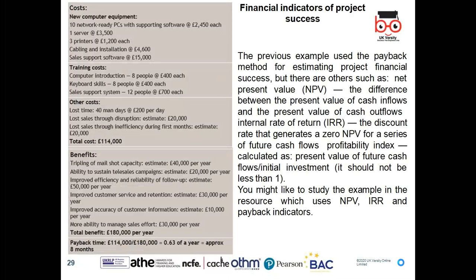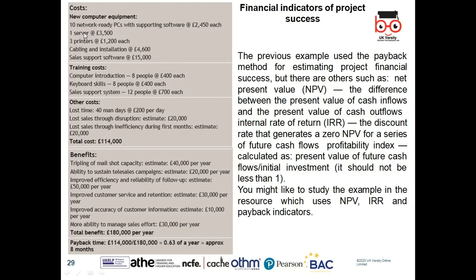For financial projections, look at costs such as new computer equipment, 10 network-ready PCs, software, servers, printers, cables, and training costs. Then assess the benefits the new IT system will bring and calculate the payback period. Investment appraisal methods include: Net Present Value (NPV) - if positive cash flow, accept the project; Internal Rate of Return (IRR) - your return should exceed your cost; and payback period - the shorter the better, as it means you recover your investment quickly.